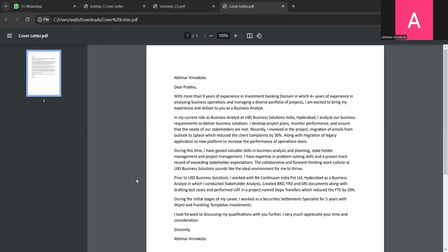It just depends on the dependency normally, because the projects we are doing are not new features, right? It's migration projects. Maximum they will be done, but if there is any dependency from other teams, then we try to move that item back to the backlog, and we'll try to pull some small feature where we can fit it into the sprint by discussing with the PO. And then the same will be communicated to the business as well.